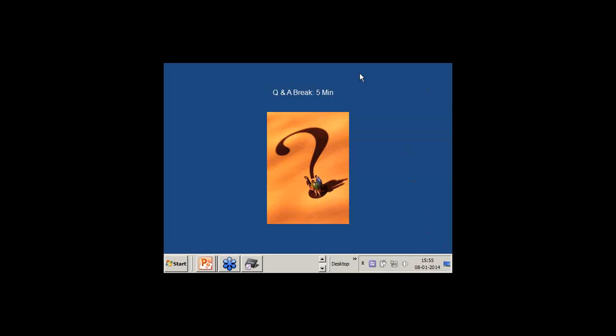The simple thing is that you make this work visible. So first you need to identify that my support work moves through 3 stages. So you visualize the workflow, and in this particular workflow, we also visualize the work. At a given point of time, how much work is pending at a given stage, and what is the capacity, work in progress capacity, WIP limit of various stages. So after making these 3 things visible, we need to ensure that we allocate work as per the WIP limit of a given stage, and we focus on that the cycle time from getting request till delivery is less, rather than keeping things pending in between. Just by making these things visible, your support process can be managed.